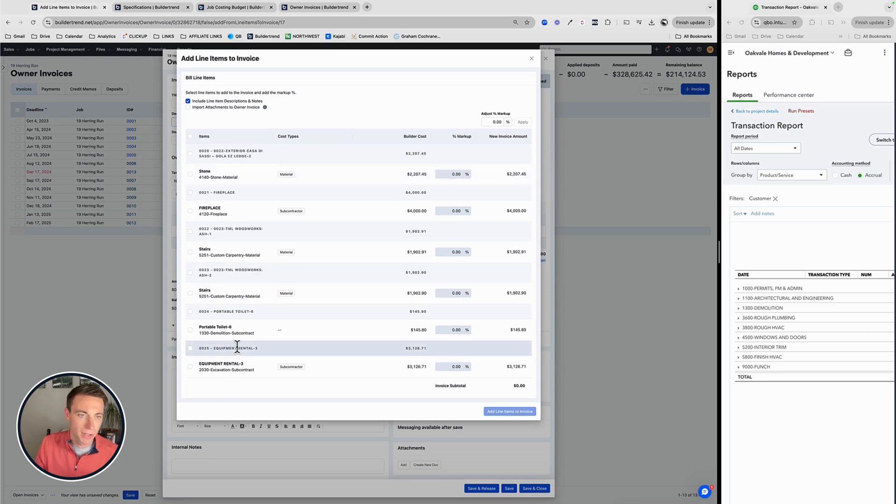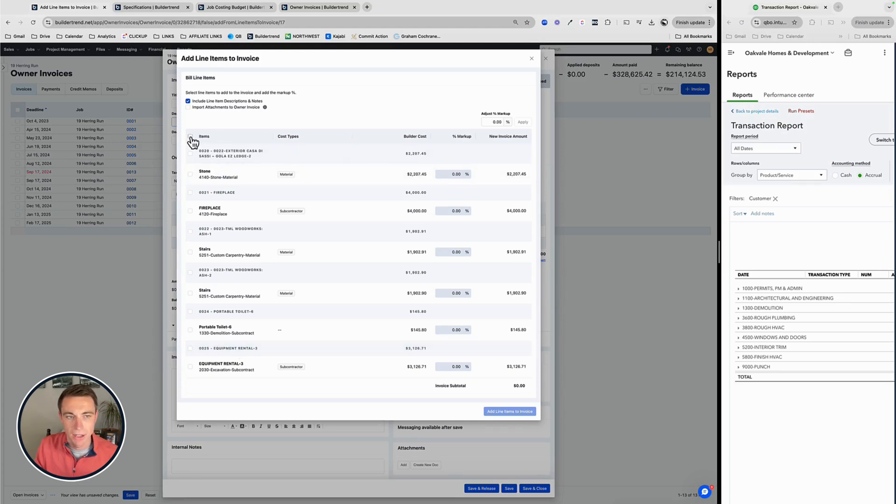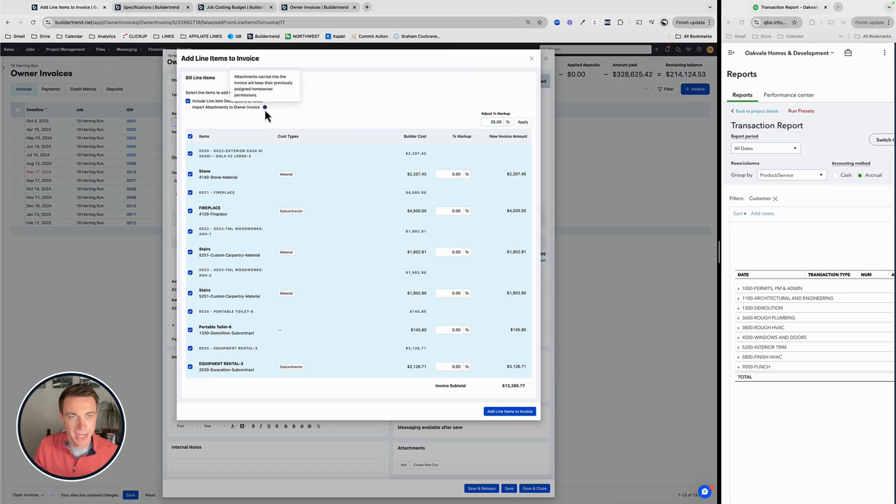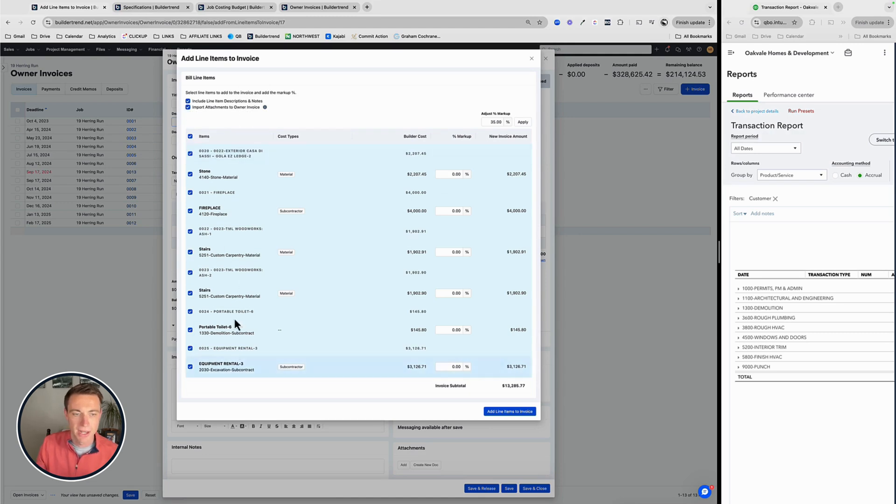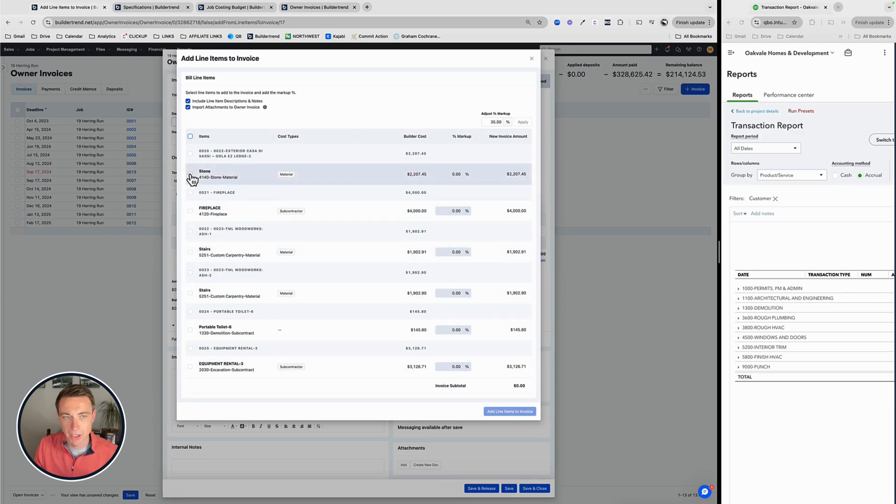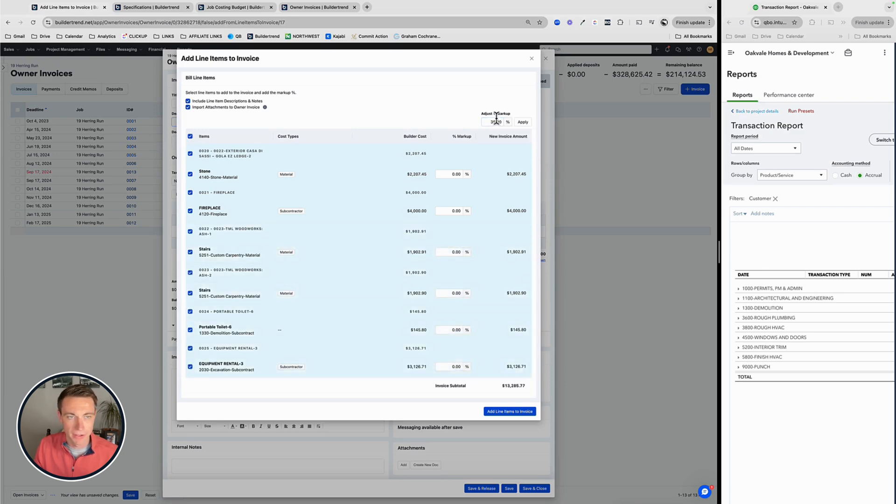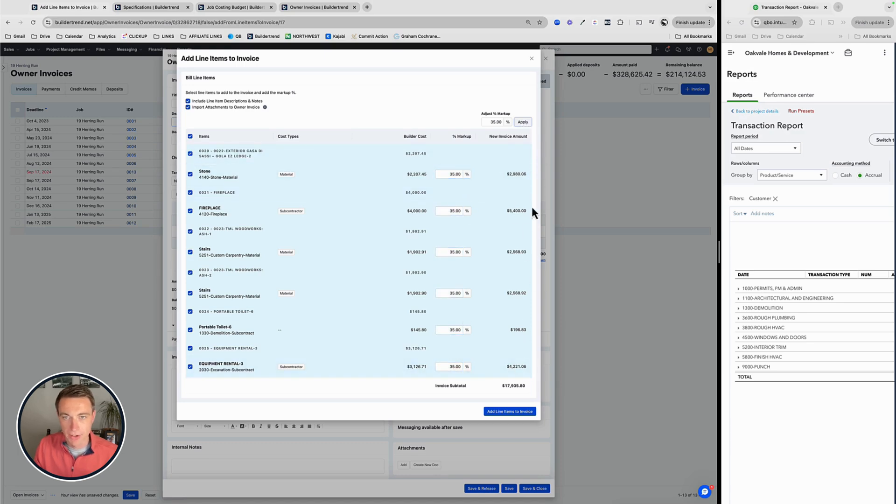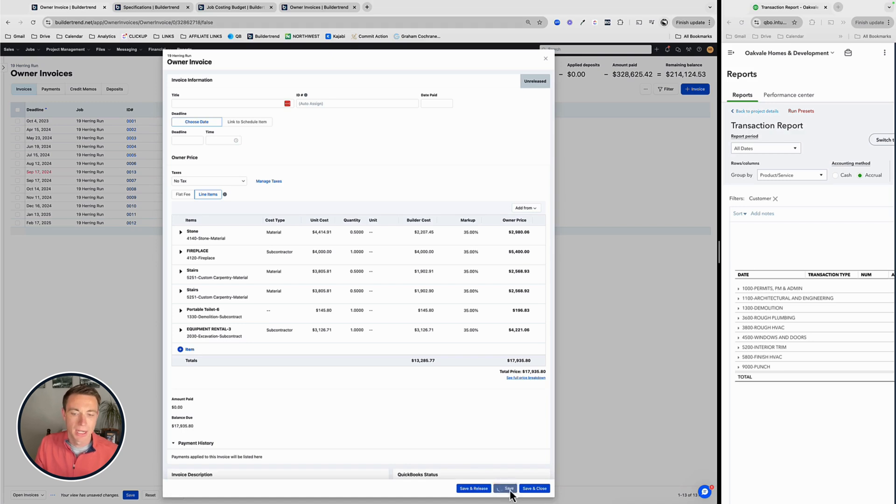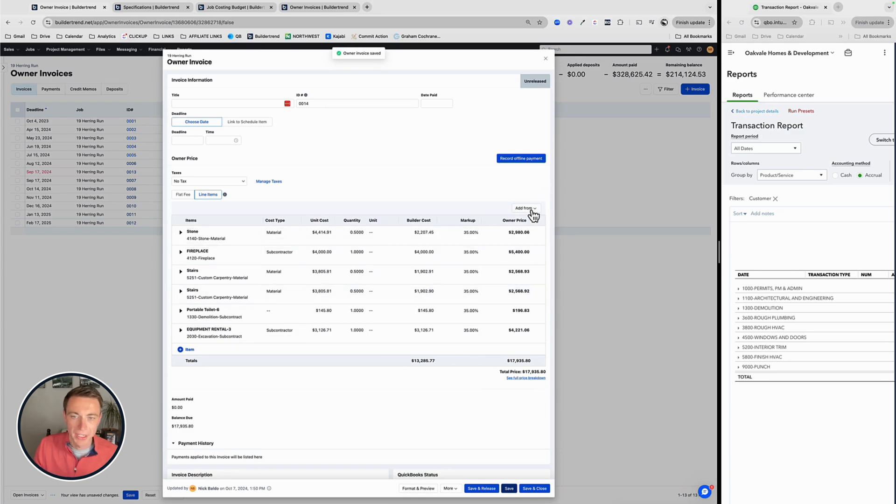So I have all my items here. Now I have a blanket 35% markup for this project for all materials and subcontractors. So I can take all of them. I can select all. And I can do a percentage. Now what I'm realizing here, this is new just as of today. I don't know if they've done this for a while, but import attachments to the owner invoice, that is a good idea too. So if you have receipts or estimates or any kind of documents stored in here, it looks like what will happen is they will be added to the invoice. And now here's my blanket markup. I can click this to apply it to everything. If for whatever reason, some of these items are going to be marked up differently, that's fine. You can go through and say, these certain ones are going to be 20%. The other are going to be whatever they're going to be. My case, everything's going to be 35%. I'm going to go ahead and add that. So it's adding my cost. There's my markup. Here's my invoice amount. Here's my total invoice. I'm going to add items to the invoice. So those have been added and I'm well on my way to have an invoice. Save frequently when you do this. Just to kind of keep things solidified so we don't lose our work.